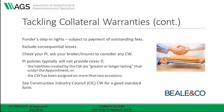Any collateral warranty with a funder will usually include stepping provisions, which allow the funder to take over your original appointment in circumstances where, for example, your employer has gone into liquidation and the funder has terminated its finance agreement. That's fairly standard. It's also fairly standard — and we would say essential — that the right to step in should be made subject to payment of any unpaid fees that are due to you, as it's likely that your employer will have gone into liquidation and fees will be outstanding.